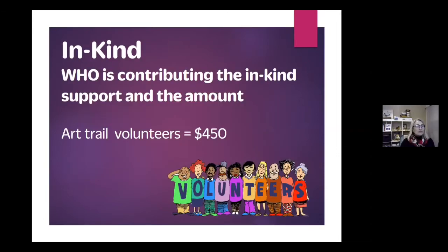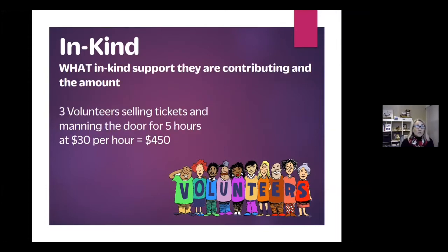Who is the in-kind? Let's say for the art trail, it's going to cost us $450 of in-kind, so that's not cash, but it feels like cash if we were really paying for them. And how I would work that out is I've got 3 volunteers selling tickets or manning the door for 5 hours at $30 an hour. So I come up with the figure of $450. If you've got 100 hours of reading a manuscript at $10 an hour, that's $1,000 of in-kind.